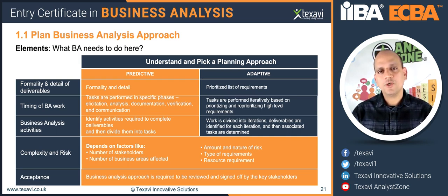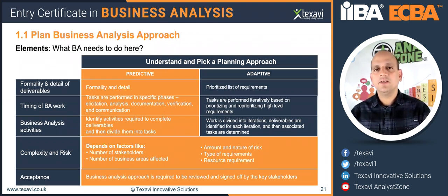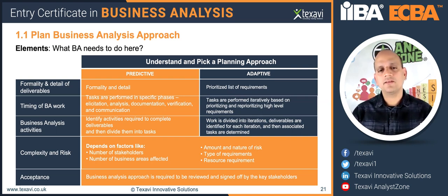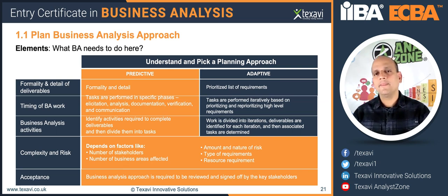If you are sure that no changes are going to happen, and as we discussed the other day, if it is already a developed product, or you're working on compliance or regulatory products, then that's where you can work with traditional waterfall. But for other types of projects, it's not suitable. Most of them have already moved to agile, in one form or another.